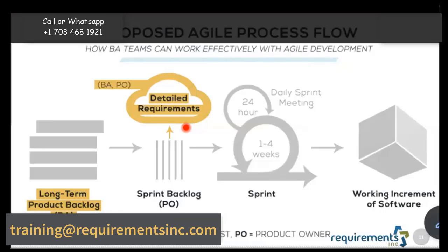Okay. So I'll give you guys how it's generally done in the industry. Sometimes, looking at a box, you'll be like, okay, this is probably 2 months worth of work. Some boxes you'll be like, okay, this is probably a day's worth of work. Some boxes you can say, okay, this is probably going to be 7 days. So at that level, you have an idea of at least the number of days, weeks, or months. First of all, the ones that are months have to be put into multiple boxes. You can't deal with that in one box because in each sprint, you want to be able to complete that box. Make sense?